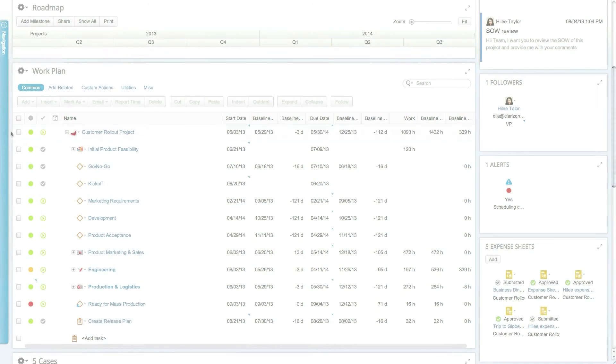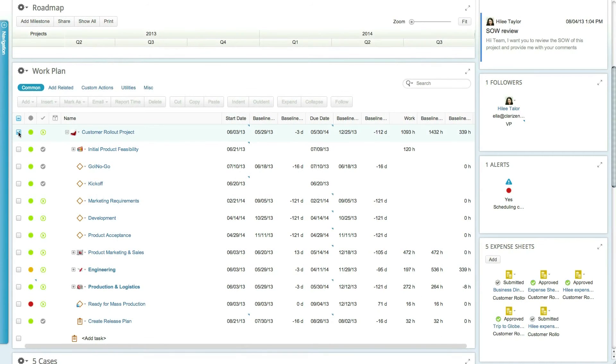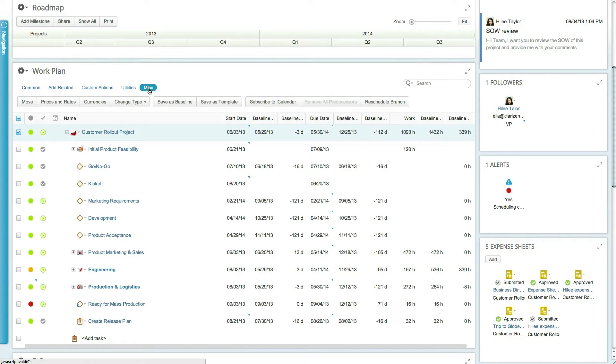You can set the project baseline at any time. To do so, simply select the project and click on the Save as Baseline action under the miscellaneous ribbon tab.